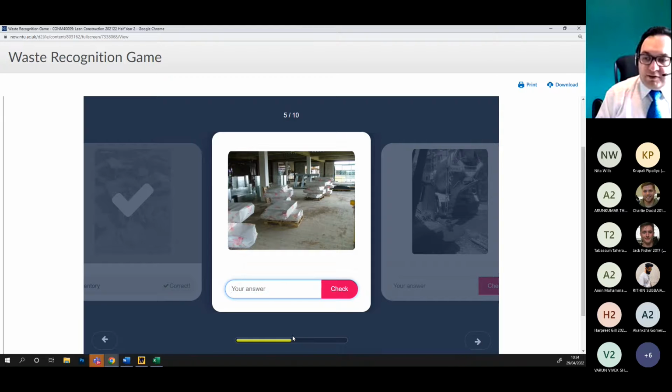Another problem, we have inventory issues as well. This side is fine, but in many cases the ground floor gets so busy in projects because it's easier to store materials and components over there. So you have a bottleneck here on the ground floor, and circulation would be very difficult, and there might be some health and safety issues as well. So, Budika, why waiting?